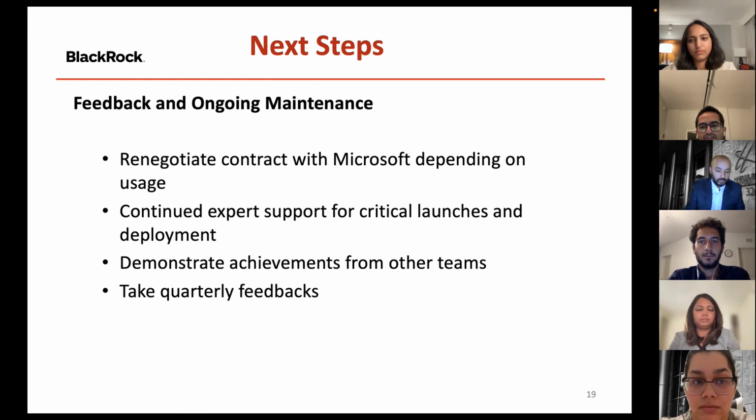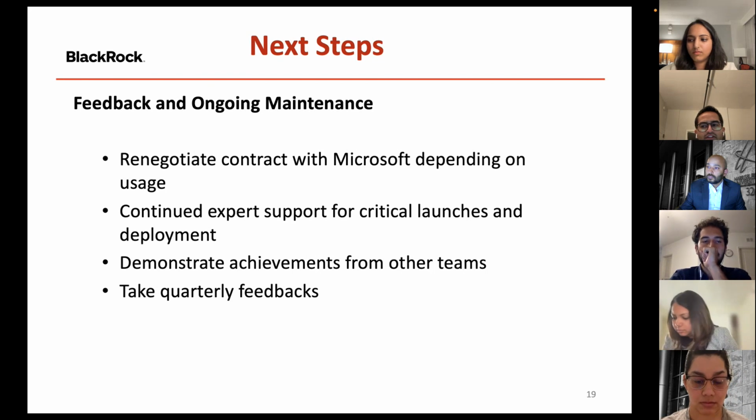Moving on to the final phase of the project, we are going to be tracking the usage of Power BI at the company to avoid some of the negative consequences that Arushi mentioned earlier. We will be renegotiating the contract with Microsoft depending on the usage of Power BI within the company. This will avoid wasting valuable monetary resources in case we don't meet the number of targeted users.